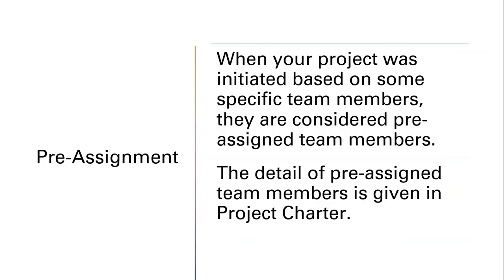Next tool and technique is called pre-assignment. When your project was initiated based on some specific team members, they are considered pre-assigned team members. And the detail of pre-assigned team members is normally given in a project charter.